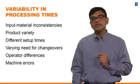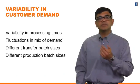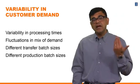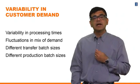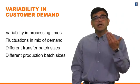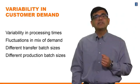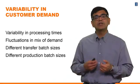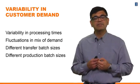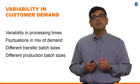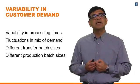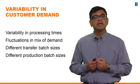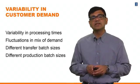Next, let's look at the variability that can come from customer demand. Different products might have different processing times, and therefore when planning for capacity utilization you have to say it depends on how much demand of which product I have. If you're making multiple products from the same process, then you have to incorporate the variability in the processing times for different products.